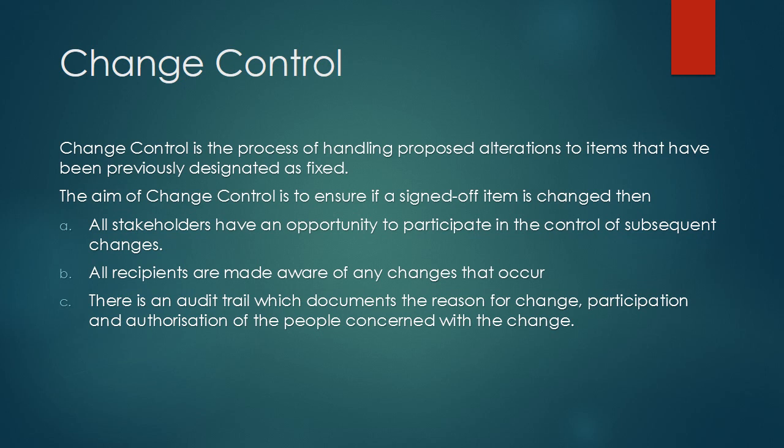Or the original change that was impacting the scope and the cost is also changing your schedule because of the rework that needs to be done. The go live date needs to be changed. So we can have changes that are integrated with each other or they can be independent of each other. There can be contract change control. There are contracts signed with the vendors, third parties, and sometimes there are provisions that some additional items may be entered, but whatever it is, it still has to pass through the change control system, or what we call the change management system.